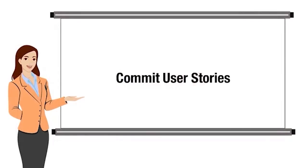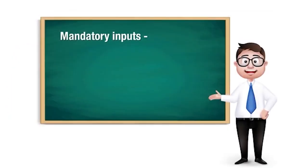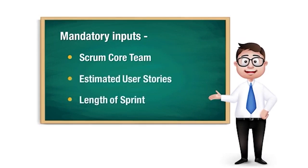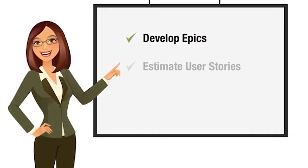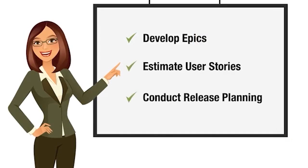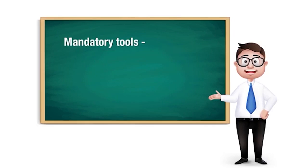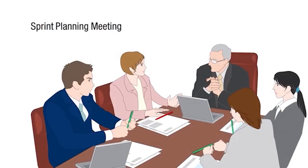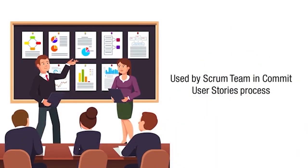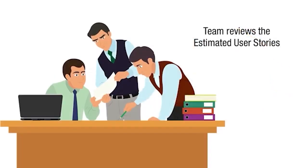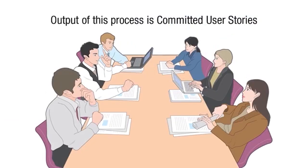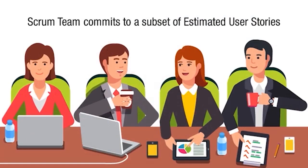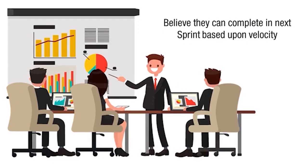The next process is Commit User Stories. The mandatory inputs are: Scrum Core Team, Estimated User Stories, and Length of Sprint. The mandatory tool is the Sprint Planning Meeting, used by the Scrum Team to plan the work to be done in the sprint. The team reviews the estimated user stories to commit to those they can deliver within the sprint. The mandatory output of this process is Committed User Stories — a subset of estimated user stories the team believes they can complete based upon velocity.